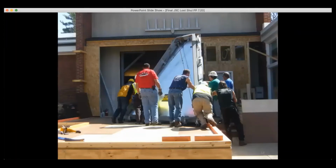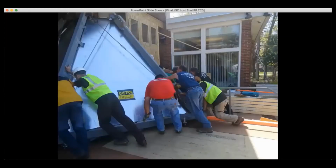Several methods of moving the mural from the truck to the building had been discussed, including using forklifts to lift the mural, drive it to the lobby, and raise it into position. But after much discussion, all agreed that the safest method was to attach temporary wheels to the bottom of the steel support structure, then use manpower to roll the 7,500-pound structure into the lobby and carefully maneuver it into position. The mural rolled into the opening with 1 inch of clearance at the top.